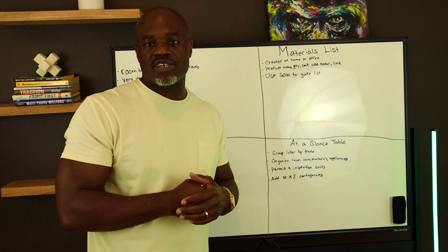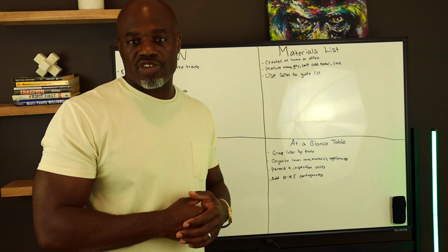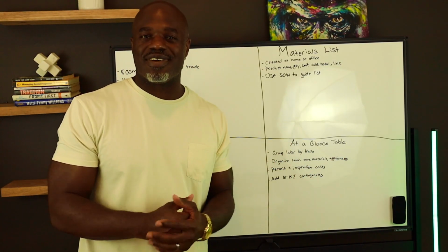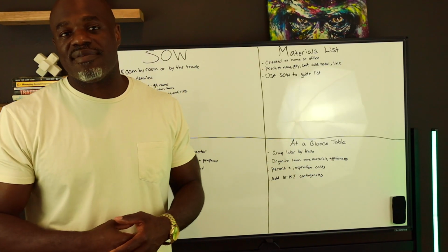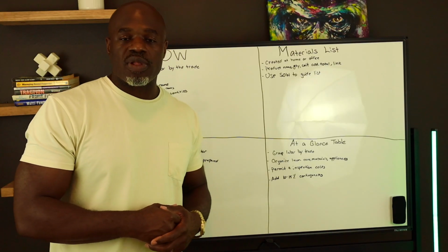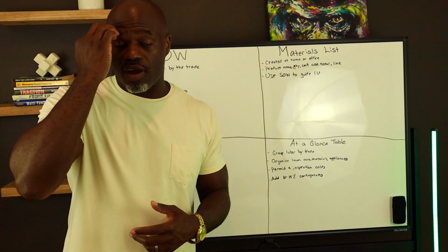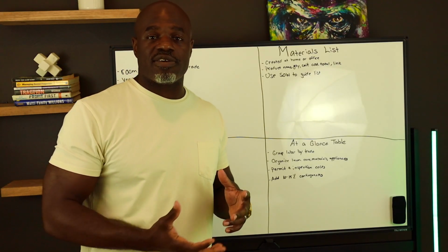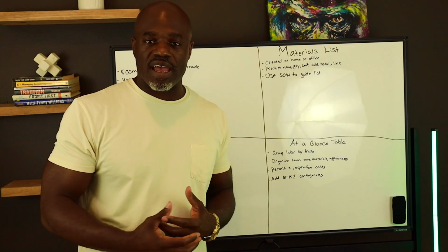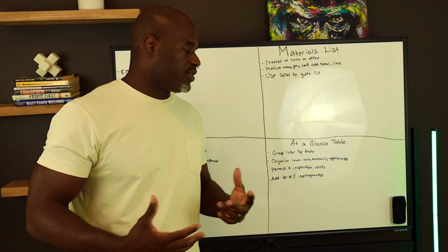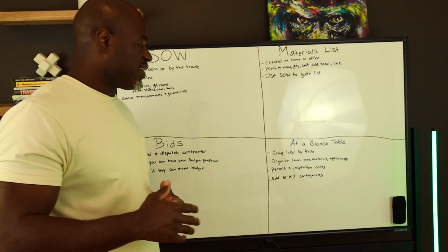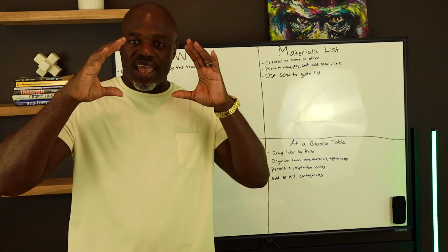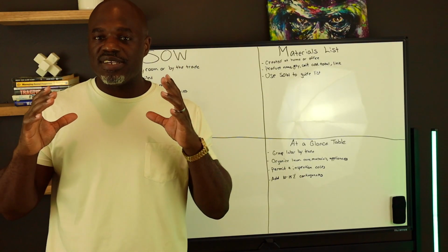Your occupancy inspection may be $90, $100. Your building permit that you have to get, because we pull permits, right? Maybe $175. Don't forget that. Whenever your MEP tradesmen are they pulling their own permits, or are they tapping onto an integrated building permit that you may already have? You want to make sure that you have all of those things budgeted, and you want to have the line item. And you want to have the line item in an at-a-glance table. That helps me so much.